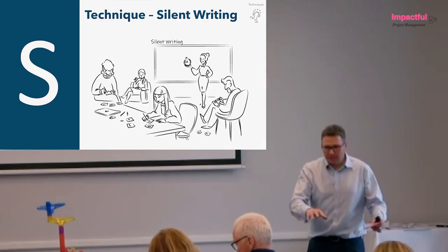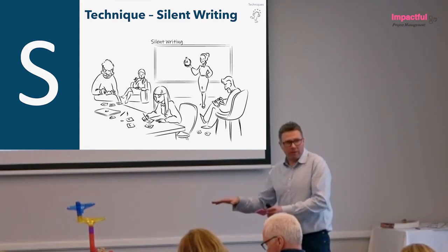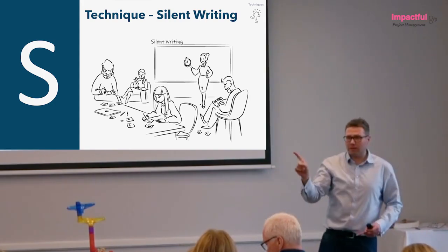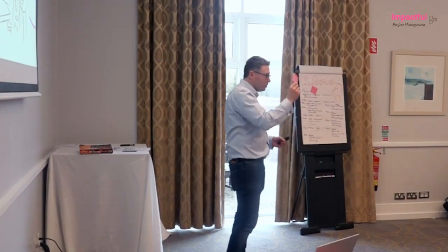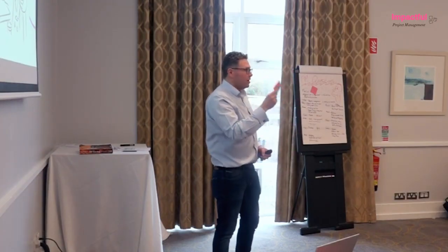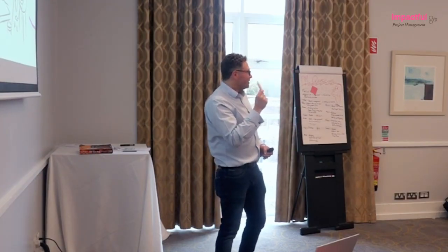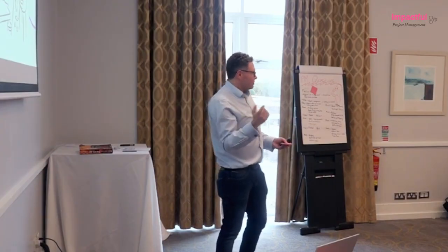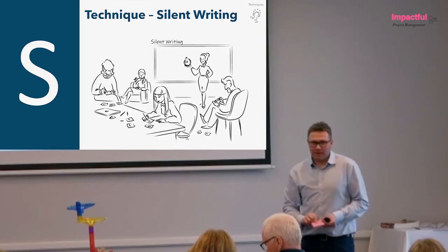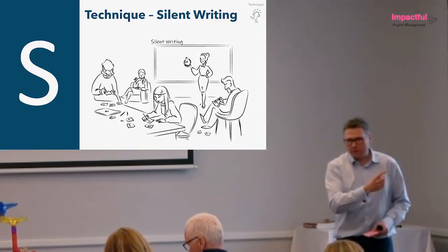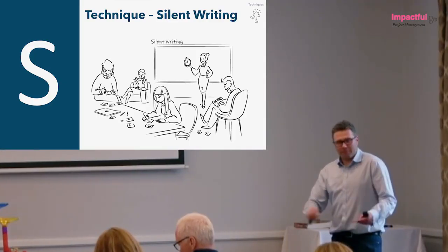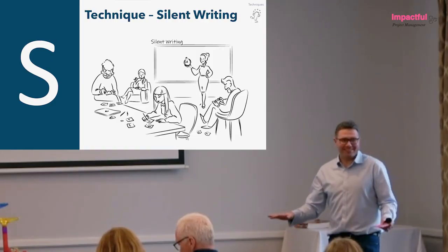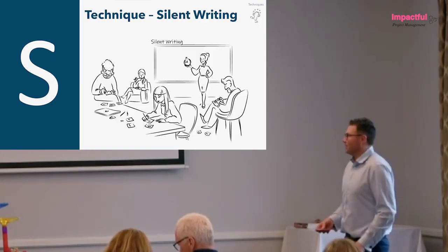I want your ideas, not the idea that you're talking about with your neighbour. I don't want anybody to come in over the top of anybody else's ideas until we've all captured all of our ideas on a post-it note. Once they're on a post-it note, they're safe. They're not going anywhere. If they're still in here, they may never come out, but once they're on a post-it note, they're safe. So that's what you do. Ask the question, set the timer, people will just start writing. And it's your job to invigilate the thing and make sure that nobody's doing any talking.